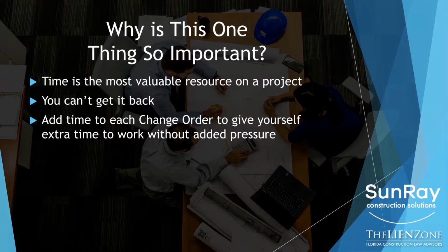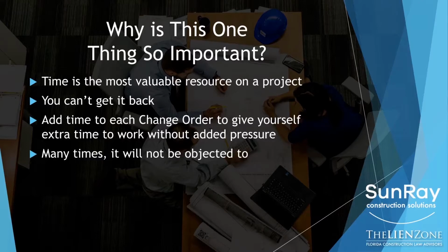So let me give you an example. Let's assume you're on a project and it's going to last 3 months, 6 months, 18 months, and you start to get some change orders very early on in the course of the project. And the time period on those change orders is zero. But if you could add 1 day, 3 days, 2 days, you can start banking some time. And the reason that this is important is because you're going to get a lot less pushback when you do this at the beginning of the job, because the job is not late.